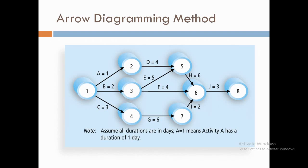For sequencing, network diagrams are used. The Arrow Diagram Method (ADM) represents activities as arrows with nodes being the starting and ending points. As shown in the diagram, activity A has a duration of one day, after which activity D is performed, and likewise one activity ends and the next one starts. The project is completed when all activities, including the last activity J, are done.